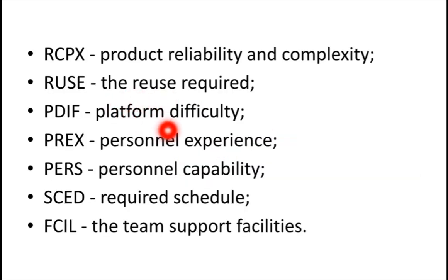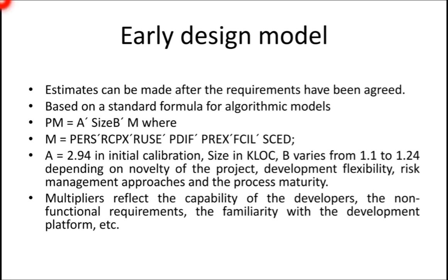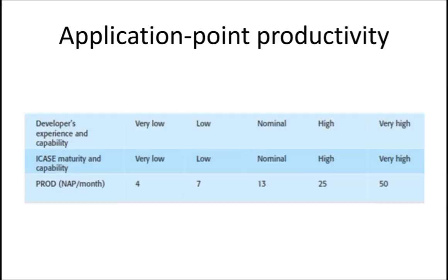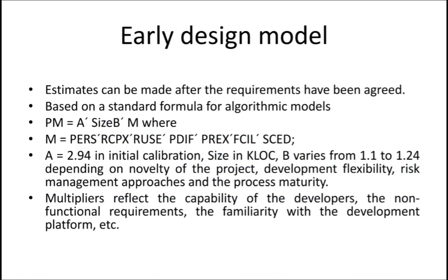PDIF means platform difficulty. PREX means personnel experience, that means staff. PERS means staff capability. SCED means required schedule. FCIL means the team support facilities. All these things are going to affect the calculation of your cost and the effort. These are all simple formulas. In the application point productivity also you have used a formula. Here also in this early design model you are using a formula, right? I'm not going to concentrate more on this table. No, it's not that important.